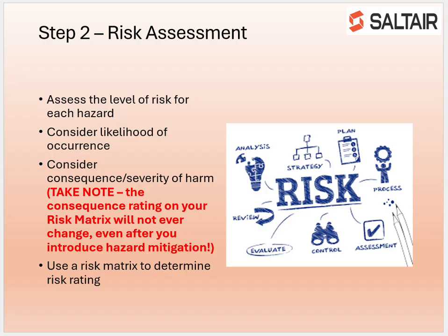The second step is risk assessment. This involves evaluating each identified hazard to determine how likely it is to cause harm and how severe that harm could be. It is important to remember that while control measures can reduce likelihood, the potential consequence of the hazard remains the same.